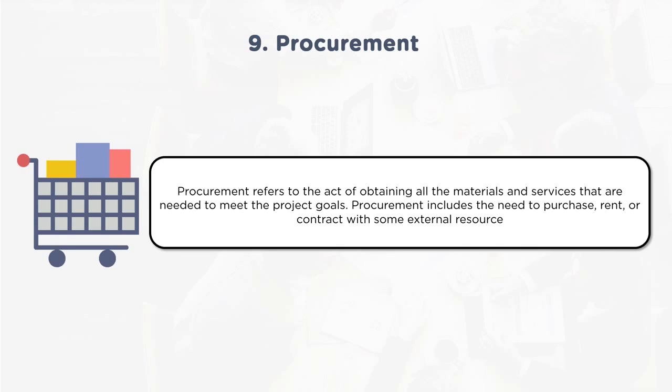So three types of contracts we speak basically. One is cost plus contract, where cost is fully known to the project manager and to the organization. So apart from known cost, a fee will be paid to the supplier. Another one is fixed price, where the project manager or the organization awarding that contract to a supplier will not know what the cost is. Instead, it is a fixed price. But important here is the scope of work needs to be clearly articulated and defined.